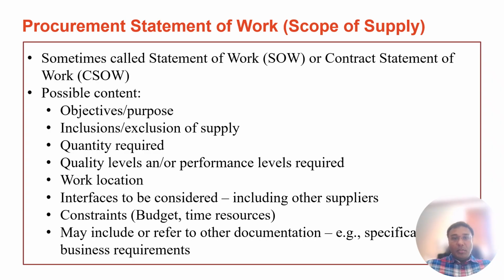So it's very important that your statement of work is defined. It needs to include what needs to be procured, or what the contractor needs to deliver, and what is not included as well. It also helps suppliers price their proposal accurately, which leads to better value for money.